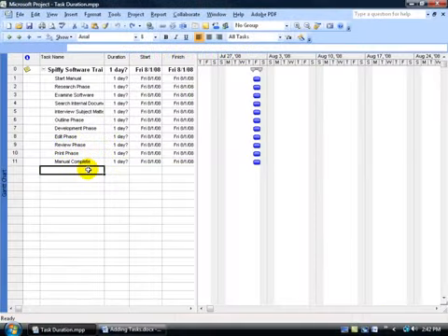As we've already seen, when it comes to creating a new task, by default, Microsoft is going to give the task the duration of 1 day. Why the question mark? Well, it's an indicator to let you know that you didn't enter in the duration, but Microsoft did, so you're not confused. The moment you come in and decide to change the day, it'll actually get rid of the